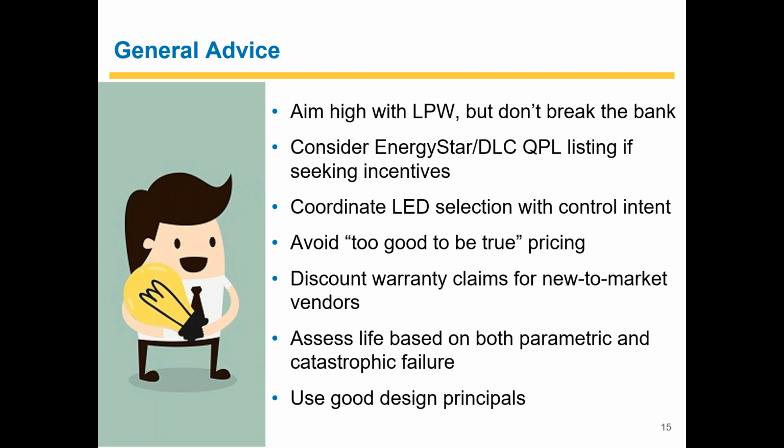You're also going to want to coordinate what you pick in terms of your LED products with your control intent. If you're using, for example, a system that uses dim-to-warm dimming, and there are a few manufacturers who use it, some of them under specific trade names, you want to make sure that the LED products you're selecting have that same sort of dimming functionality. That will have a big cost impact on your control intent, or on your control bill at the end,